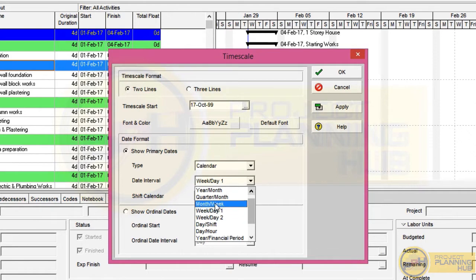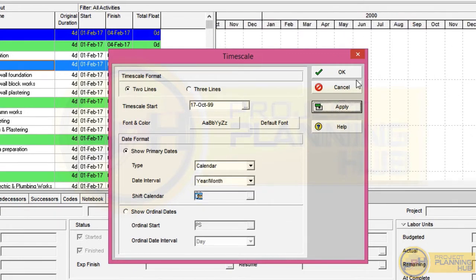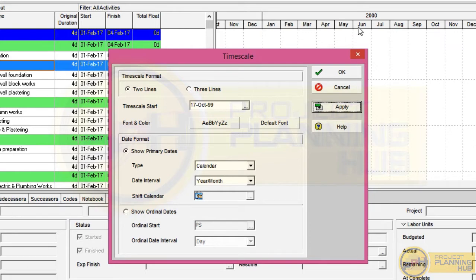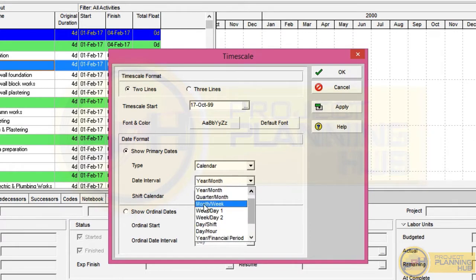For example, if we select year per month, the top row will display the year and the bottom row will display the months. Let's apply it — see, the year 2000 appears on top and the months January, February, March appear below. In big projects with one year or more duration, this format saves Gantt chart space. We also have many other options — just select any option and apply it to see the changes in the Gantt chart.